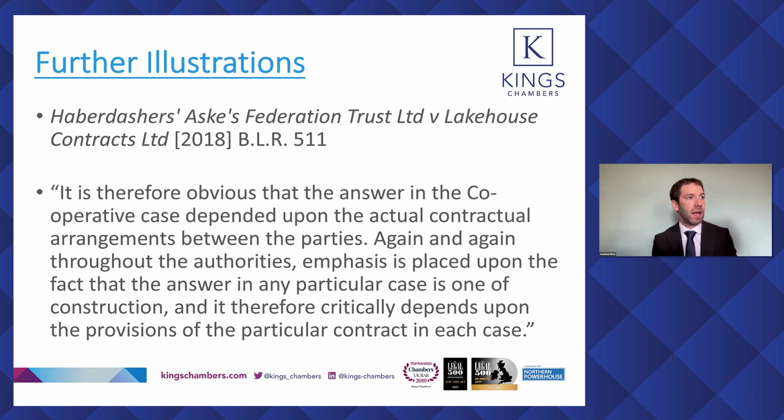So as the judge in that case in the TCC said, it was therefore obvious that the answer in the Co-operative case depended upon the actual contractual arrangements between the parties. Again and again throughout the authorities, emphasis is placed upon the fact that the answer in any particular case is one of construction, and it therefore critically depends upon the provisions of the particular contract in each case. The reference to the provisions of the particular contract, I read primarily as being a reference to the building contract rather than the policy of insurance.